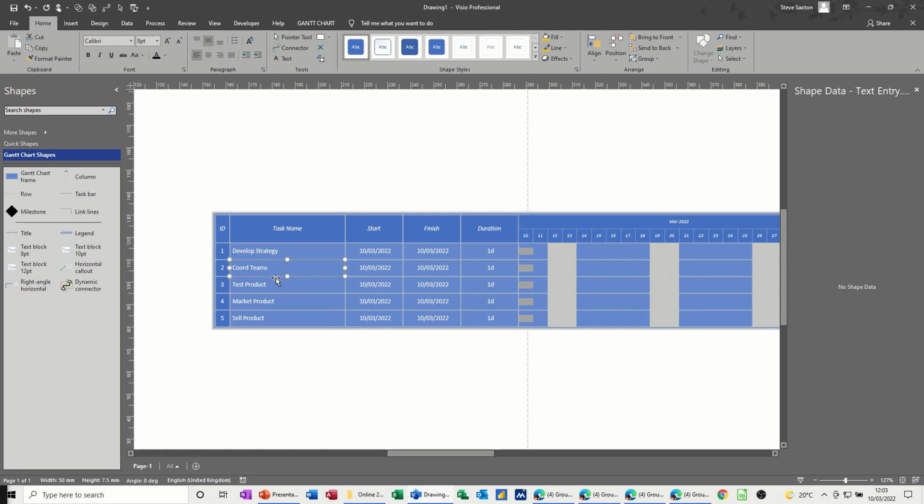Now obviously this is the title, and I want these to be indented underneath the title. So what you have to do is just basically hold your shift key down, click on each one of these tasks like so, and then up on the top here you've got decrease, increase indent. So I've increased the indent like so. Now the date and time and durations are all listed there. So if I say 2 days for that, 2 days for this, and 2 days for that. I missed that one, 2 days. Let's say 2 days for everything.